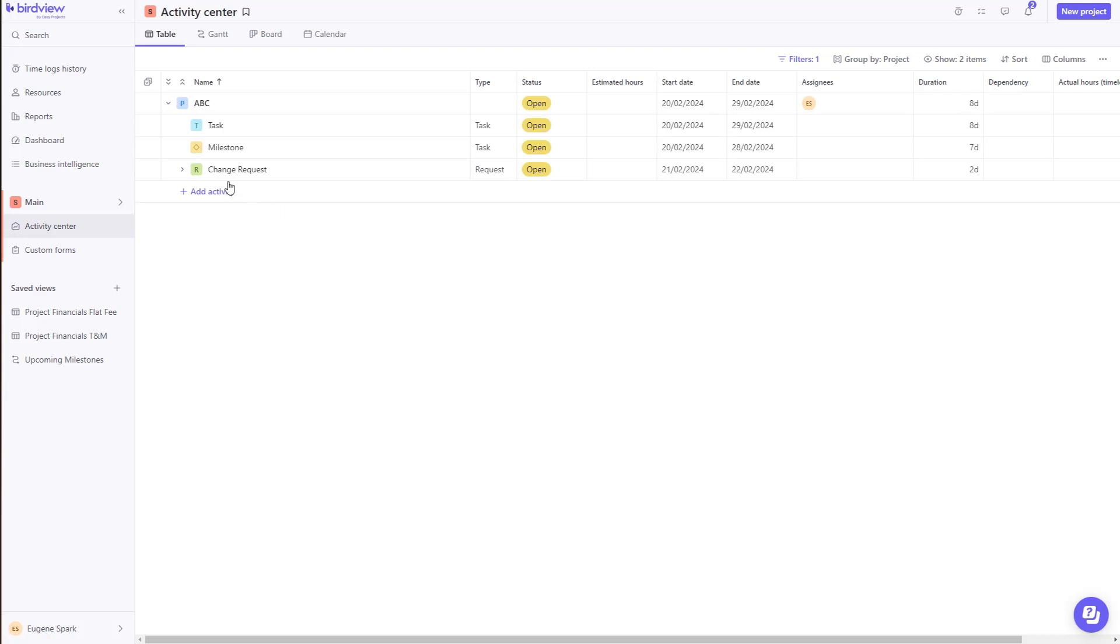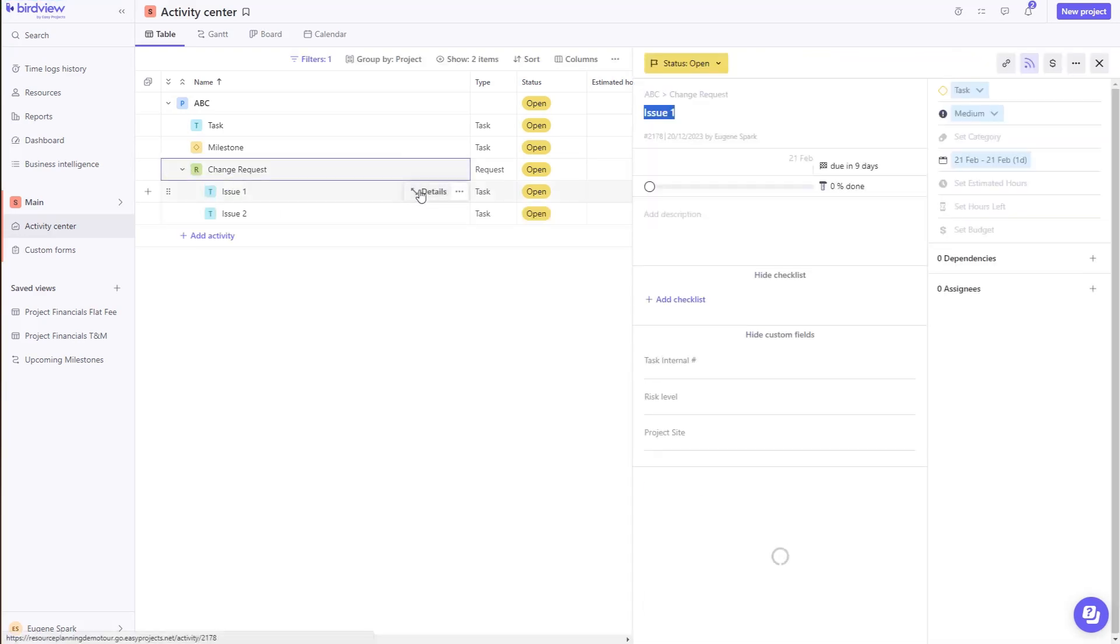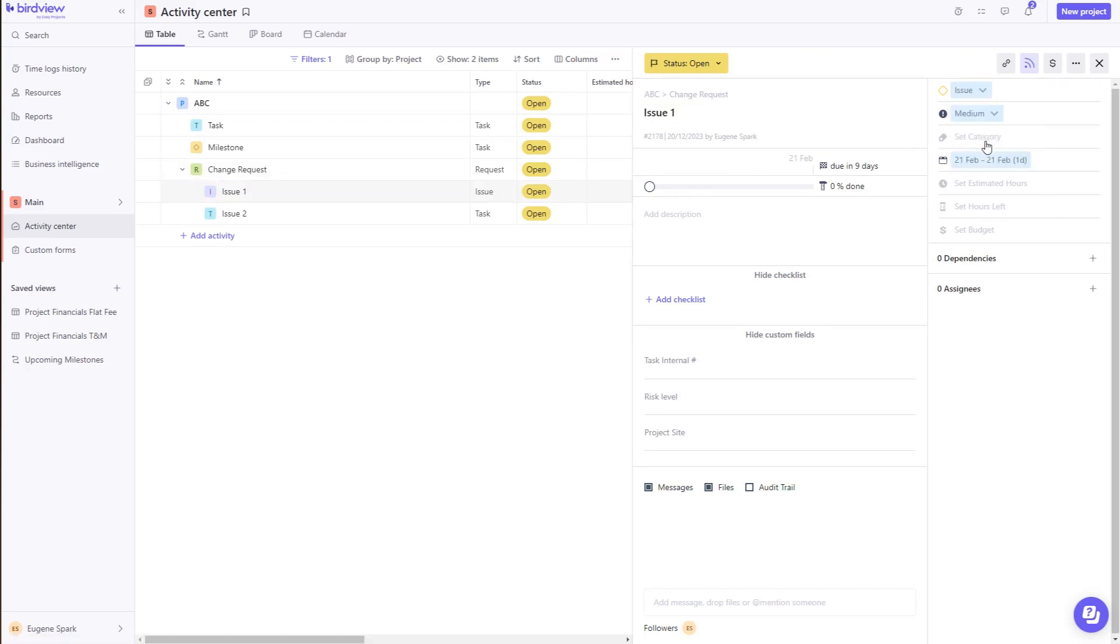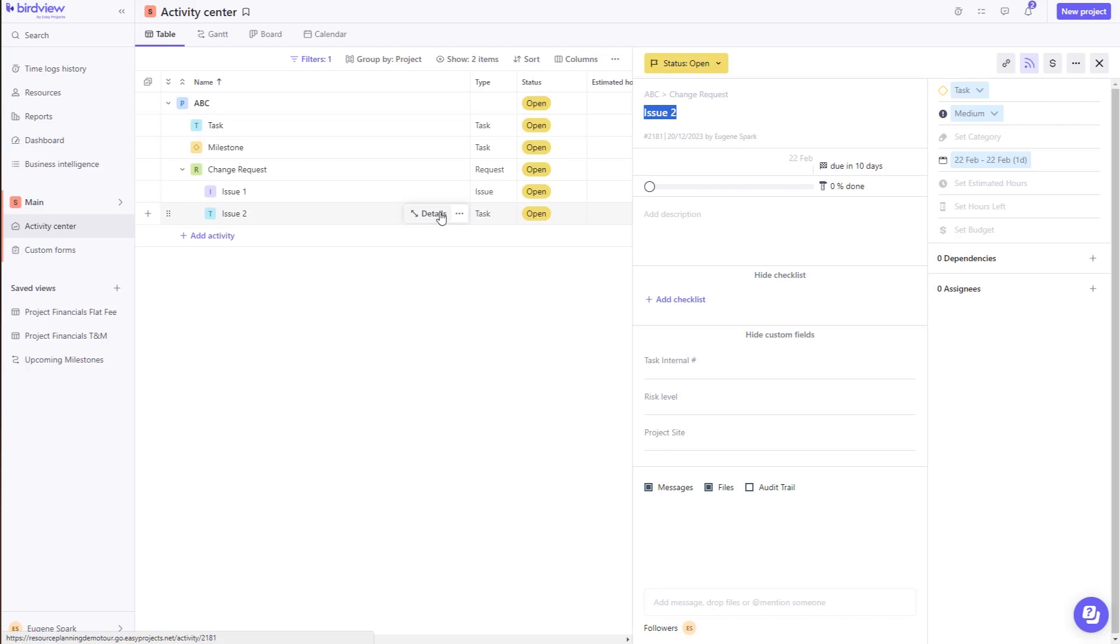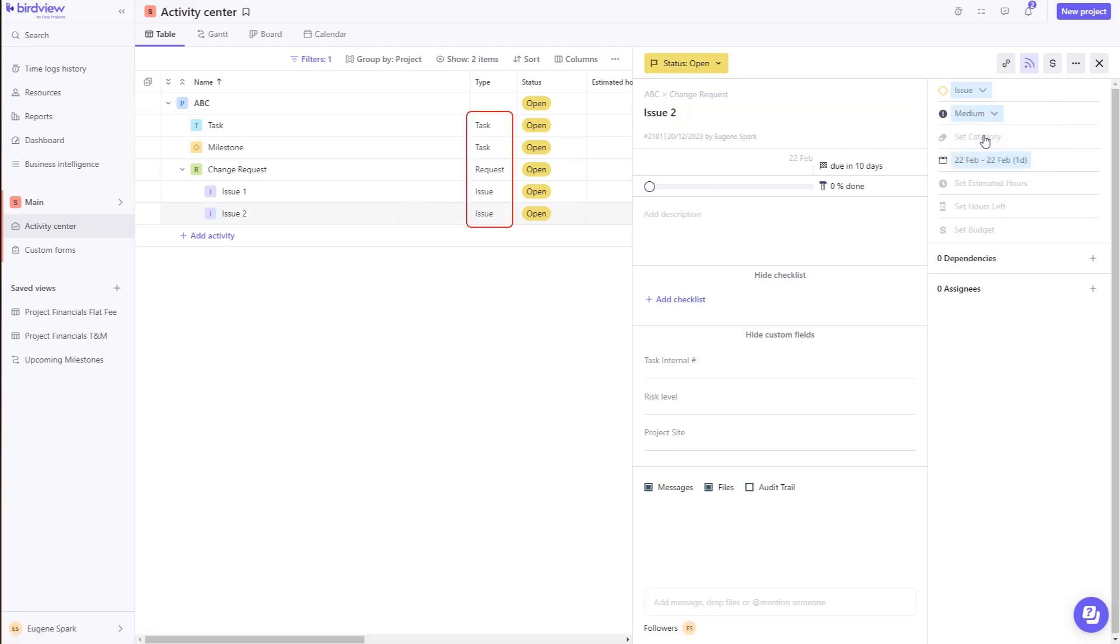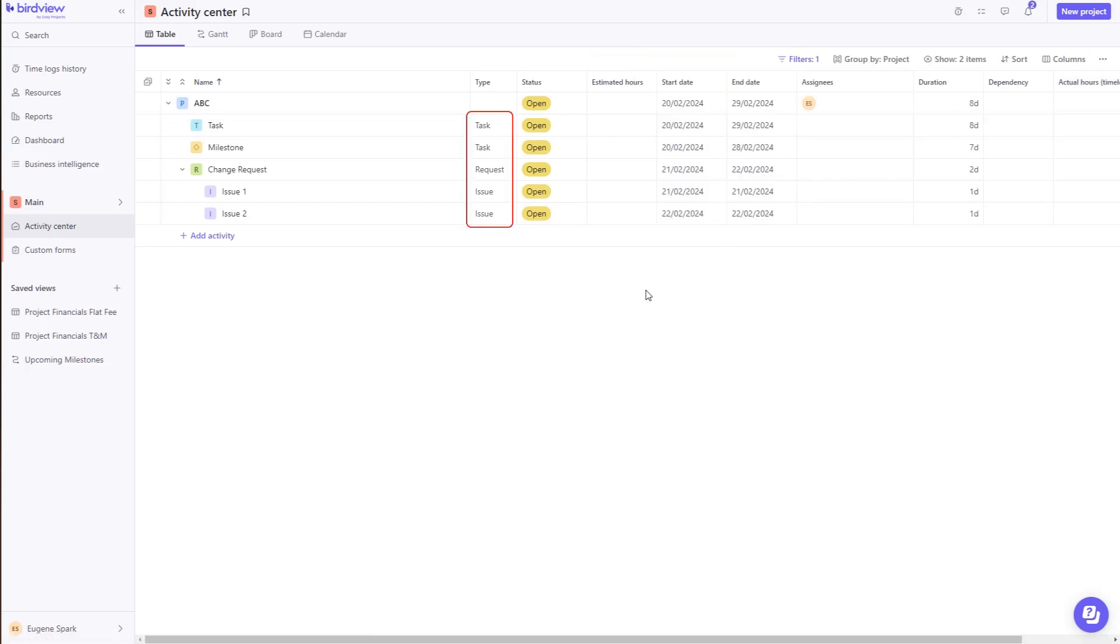More often than not, a change request can lead to some issues. Why not track those issues on the same project? Go back to the activity type, and now switch it to issue. Now you have your issues, the requests, the tasks, all in a unified space on that specific project.